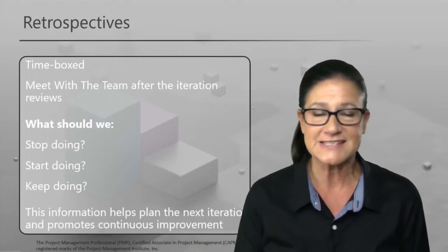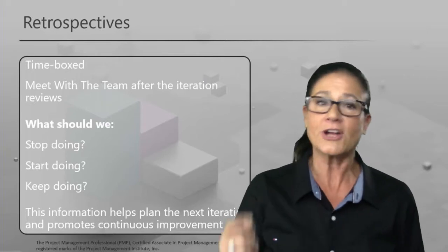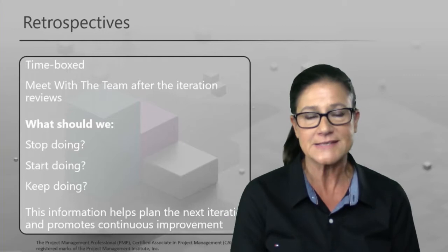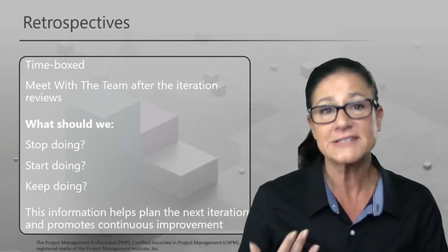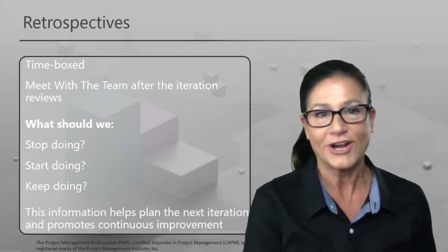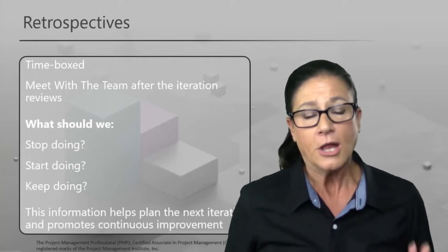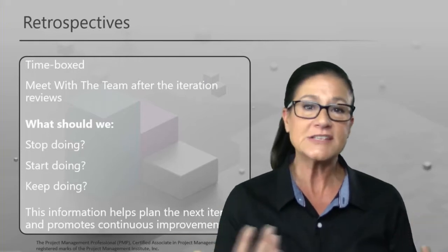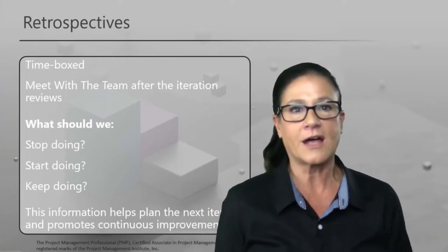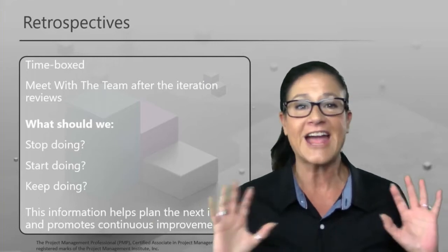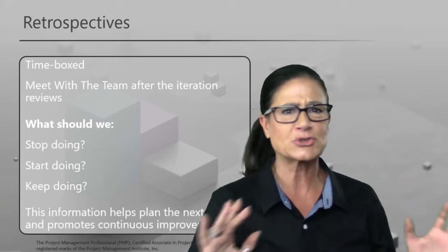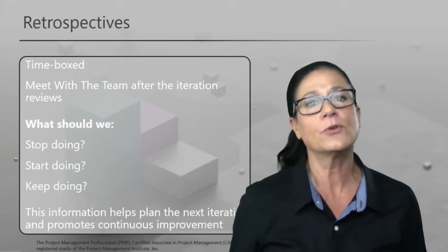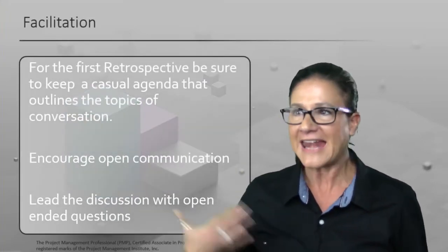The key to this as a facilitator, so let's say you're a project manager, a scrum master, an agile coach, whatever that is, is to make sure that, one, the team keeps it in the time box, so you don't go over the scheduled allotted amount of time, but also to make sure that your team is transparent in their communication. This is supposed to be an area of communication without any external influences, sponsors, bosses, customers, anything like that, where the team can get together and really focus on the team.